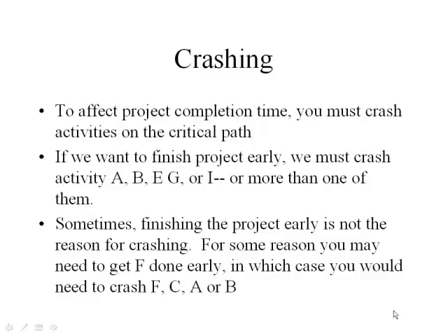If our objective is to get the project done early and we're in the early stages of the project, then chances are if we crash any activity on the critical path, it will improve the due date or the completion date of our entire project. So that raises the question, which activity should I crash? Which activity should I expedite?